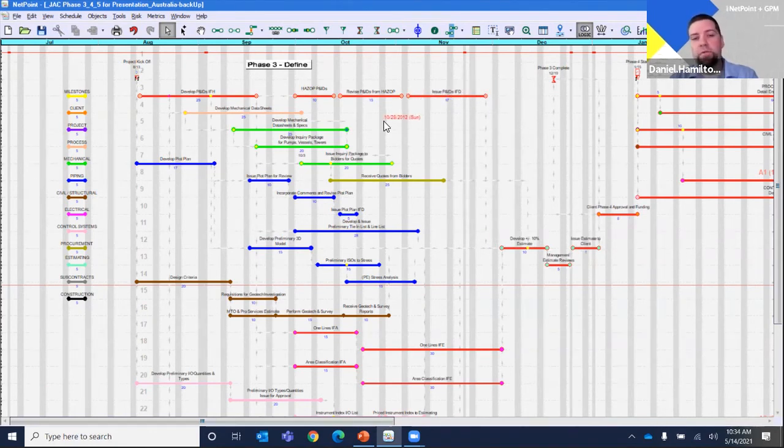And even at times, I find sometimes in interactive planning sessions that we just can't make the end date that we originally thought, and things start turning red, and we have to go back and reduce durations, or that really is how long it's going to take us, and we just have to accept it. That's why it's imperative to have the customer client in these meetings, to show them that, hey, our durations are extending beyond what we thought the original plan was going to take.